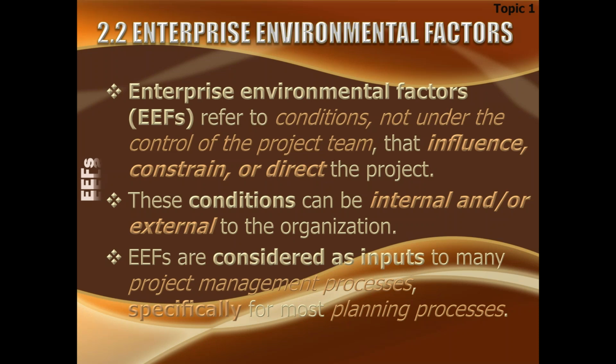You see, government has announced that all the work on this kind of projects must finish by 31st of December, countrywide. Maybe after 31st December, the weather conditions are going to change or something. So by 31st of December, all projects must complete. Now, you are bound to complete it within that time frame. These conditions may be internal or external.